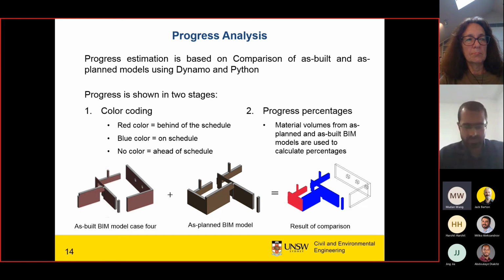So you are focusing more on the management perspective in real practice. Exactly, because we wanted to shorten this process and calculate the progress of the work accurately and in a timely manner. Because usually on a construction site, from my experience, there is always a claim between client and contractor. The contractor always tries to claim more work than they have done to receive more money, but on the other side, clients want to pay less money, to be assured that the contractor does the work first, then gets the money.